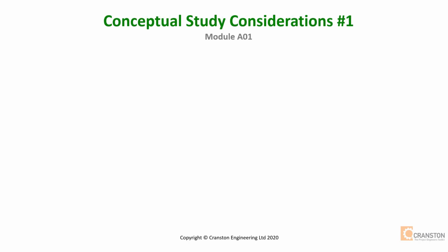Some considerations for the conceptual study. First, location and topsides. Existing space on an offshore installation is always at a premium, and options for installation include a cantilever platform, destructing the existing accommodation, deck clearance and removal of redundant equipment.